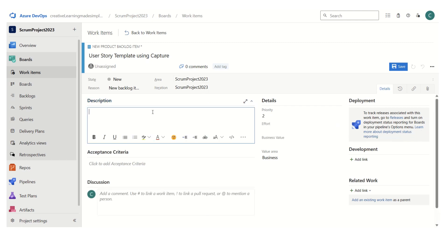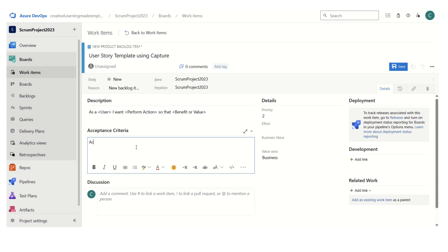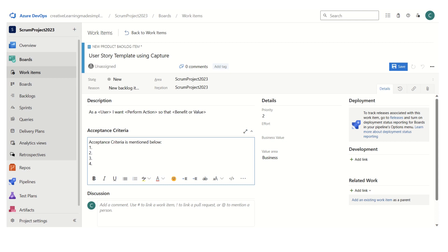The priority, I'll keep the same; area path and iteration path are the same. And here I am writing 'As a user, I want...' with the benefit or value mentioned below. So this is our template that we want to create for our user story or product backlog item creation — we have specified the necessary fields.